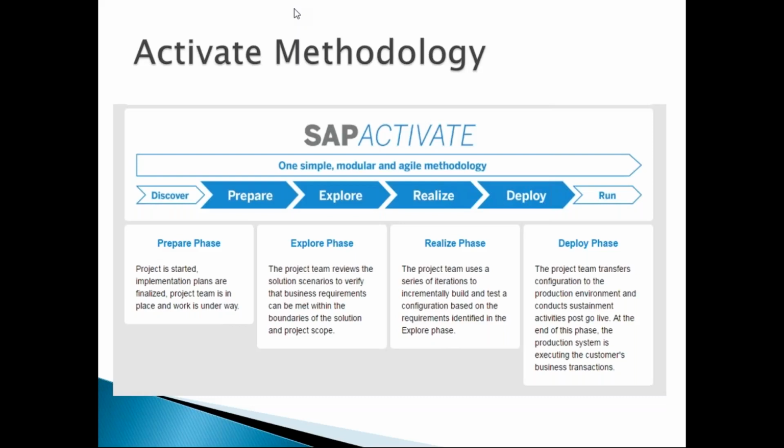So we divide this project timeline into different parts, like every 5 or 6 weeks, and we go in front of the customer. So first, in the 6th week, we go in front of the customer, we demonstrate the product, whatever are the observations, feedback, any changes, we record them. We come back to the office and we work for again 4 to 5 more weeks. And again, somewhere in the 12th week, I'll go for the second round of demonstration.